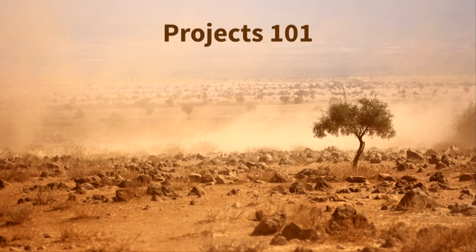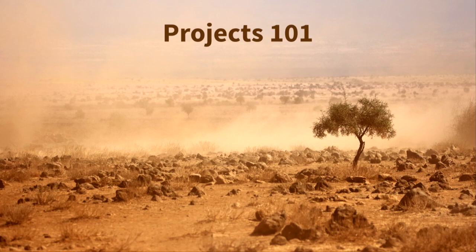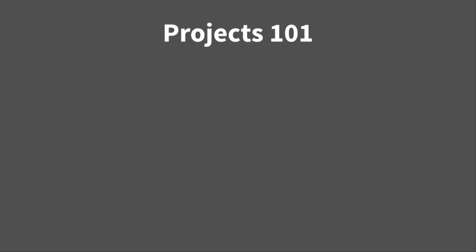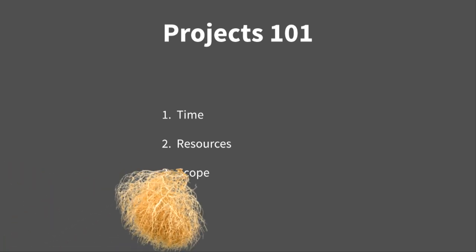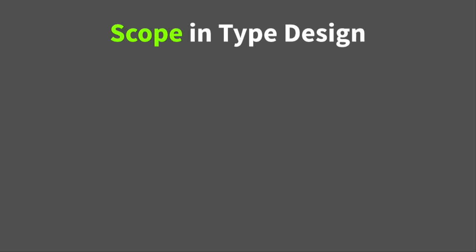Okay, I have to talk about project management stuff for a minute here. It's a little bit dry, so stay with me. Project 101. There's three aspects for any project. First one's time, resources, and scope. In terms of time, we knew that if we were going to experiment with something, we'd have about six months. And for resources, well, that was simple. We had Miguel. And scope is where it starts to get really interesting. So how do we scope a typeface?